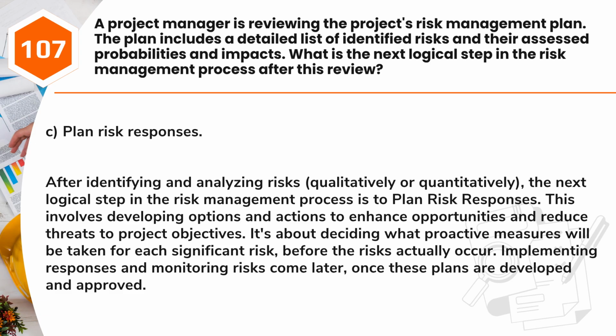Answer: C. Plan risk responses. After identifying and analyzing risks, qualitatively or quantitatively, the next logical step in the risk management process is to plan risk responses. This involves developing options and actions to enhance opportunities and reduce threats to project objectives. It's about deciding what proactive measures will be taken for each significant risk, before the risks actually occur. Implementing responses and monitoring risks come later, once these plans are developed and approved.